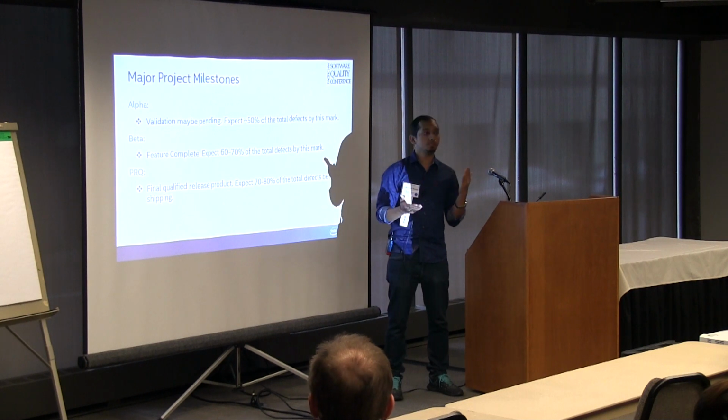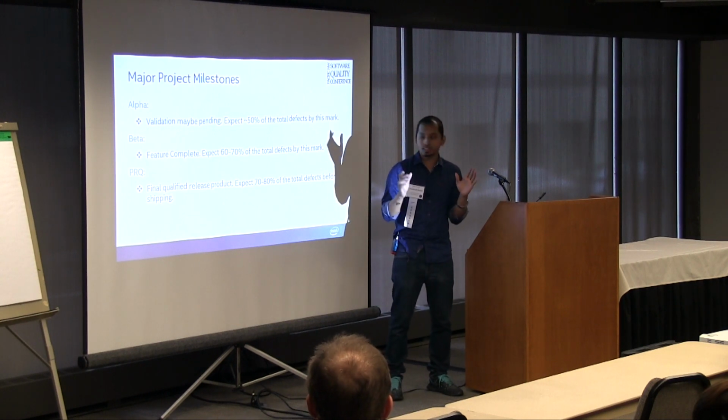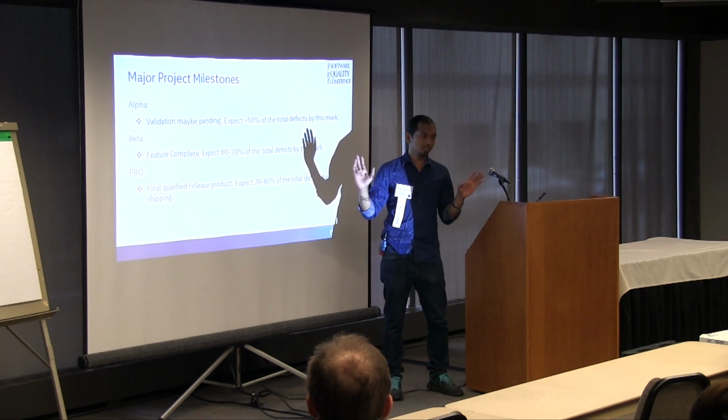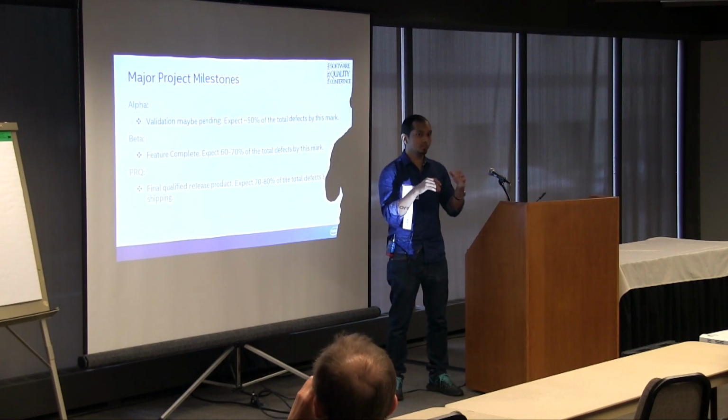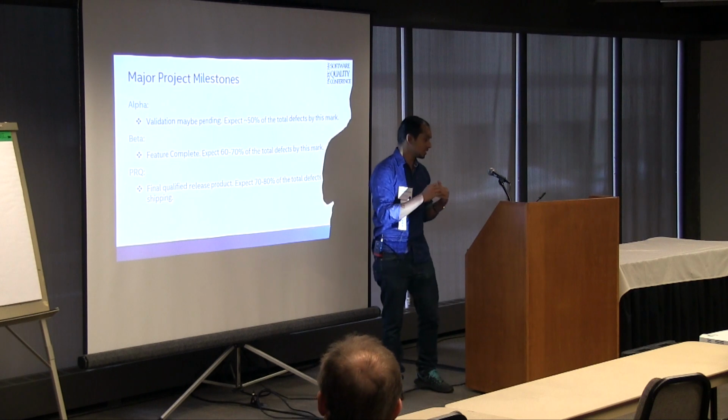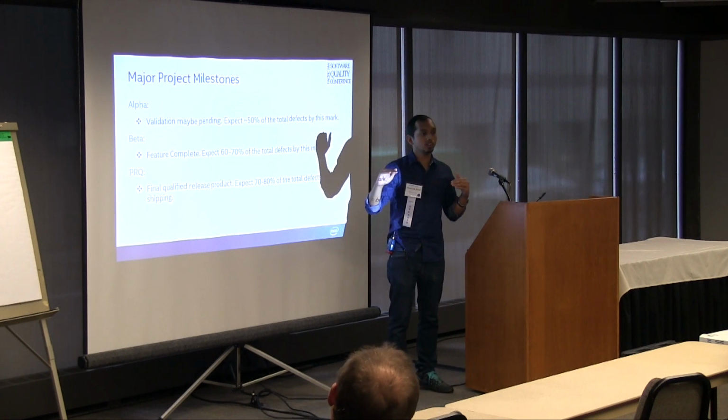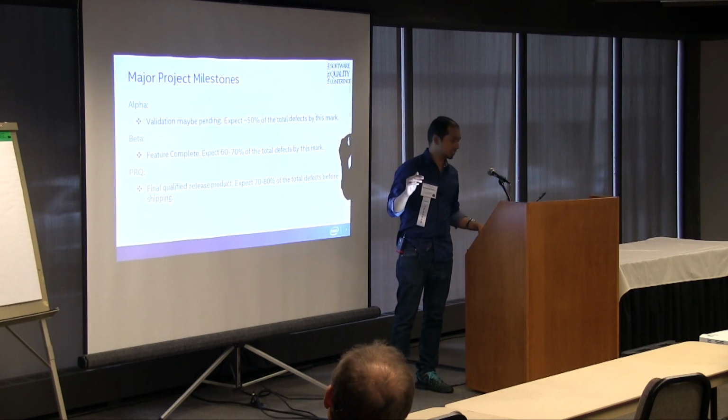So same thing goes with PRQ, which is the final release. We want it to be 100%, but we know that it's not going to be. So we expect around 70 to 80% of the defects being resolved by this time. So this is our benchmark. We want this to happen in all our projects.